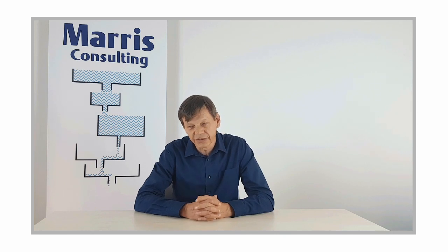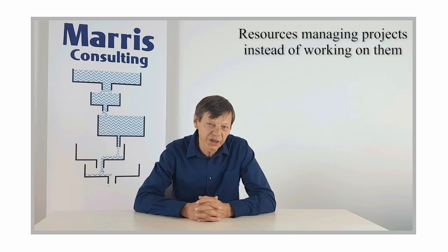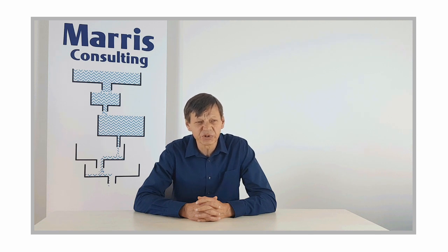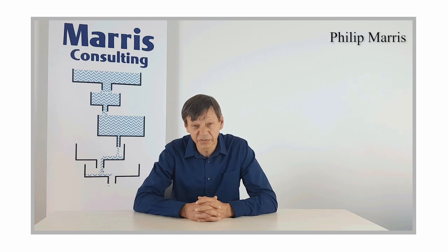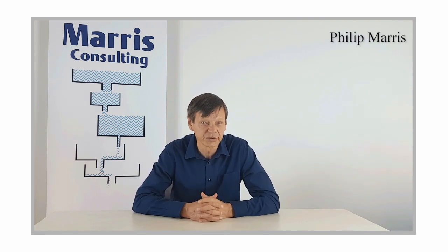Another characteristic of these chaotic environments is the extraordinary proportion of time spent by various people managing the projects, not doing them, managing or administrating or monitoring them. Okay, you'll have one person, sometimes teams of people on larger projects, whose only job is just trying to update the different project management sheets. Another person who plays around with the numbers and the timesheets. Yet another who does this kind of control and whatever. And then you have managements and managers and management teams and reporting meetings and stuff. And you'll end up with organizations where 10%, 20%, 30% of their time is spent not actually doing the project, but managing it. In fact, with zero value added,